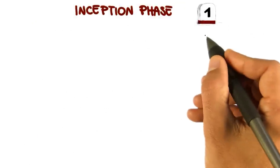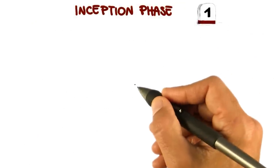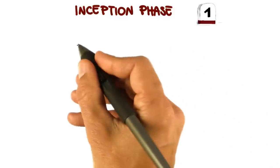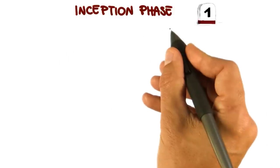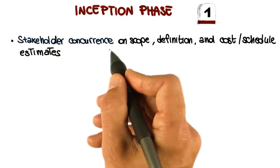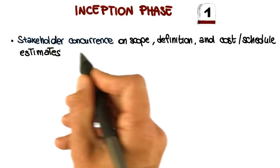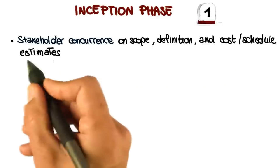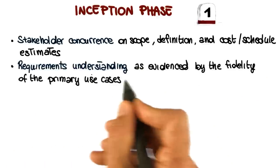So when we're done with the inception phase, we hit the first milestone for the cycle that we're currently performing. And so there are some evaluation criteria that will tell us whether we can consider the inception phase concluded or not. The first of these criteria is stakeholder concurrence, which means that all the stakeholders must agree on the scope, definition, and cost schedule estimates for the project.